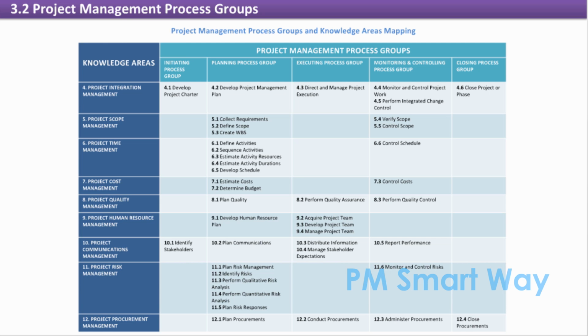We know from earlier discussions that nearly all processes interact and have dependencies with each other. For example, developing a budget for labor costs depends upon having a solid idea of what tasks are involved, what types of personnel are needed to perform the tasks, and how much effort the tasks will require. Misinformation in any of these will result in a budget that is fatally flawed.